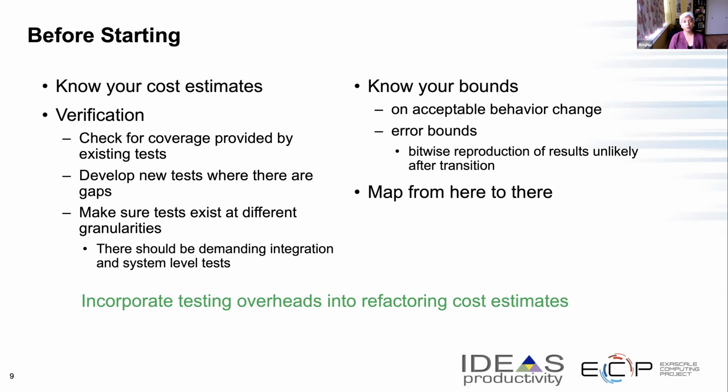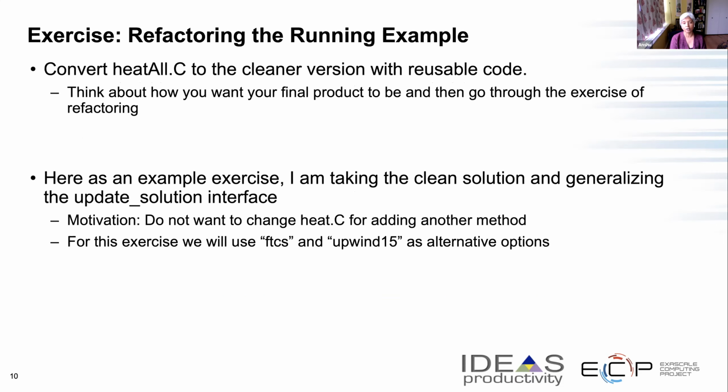And when you are doing your cost estimate, make sure that you incorporate testing overheads into the refactoring cost estimates. If you have to develop new tests, they should be part and parcel of the cost estimate, because that's non-negotiable. You should have enough tests.